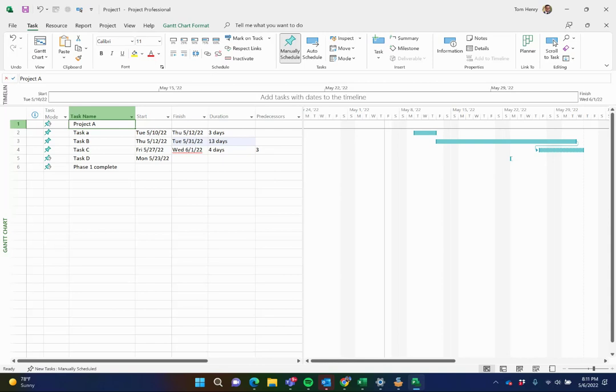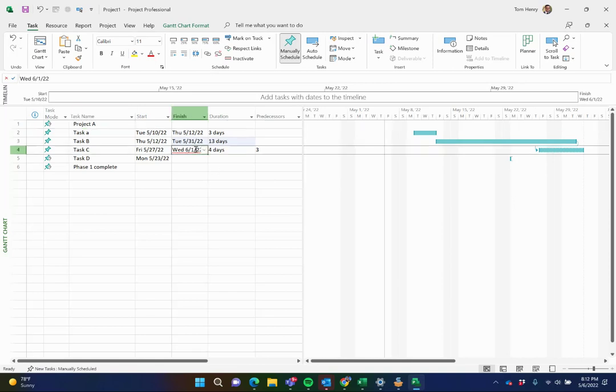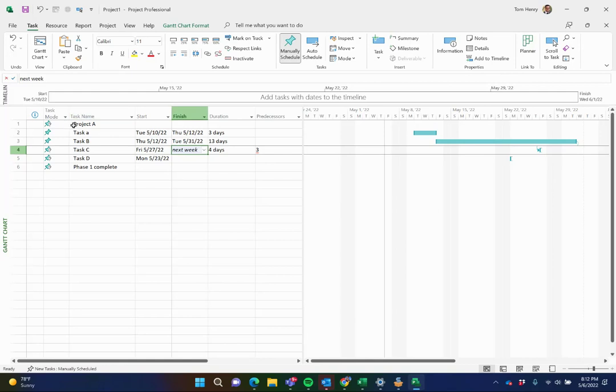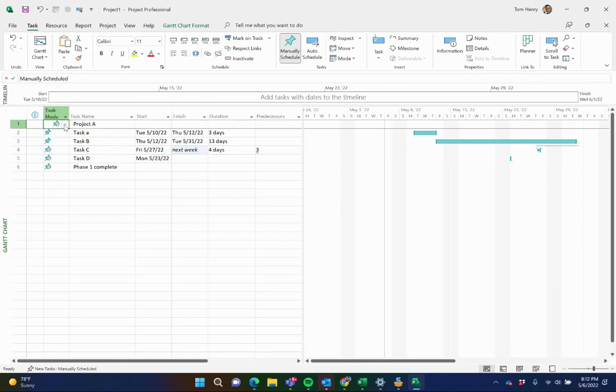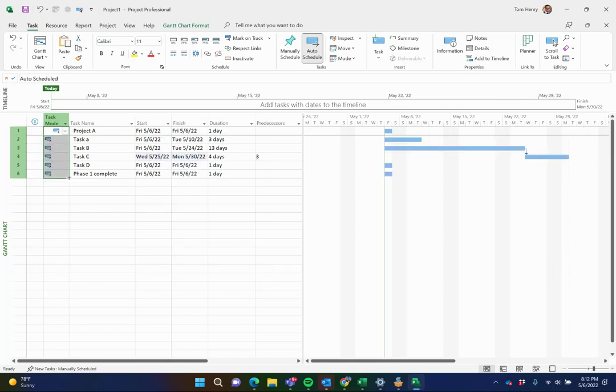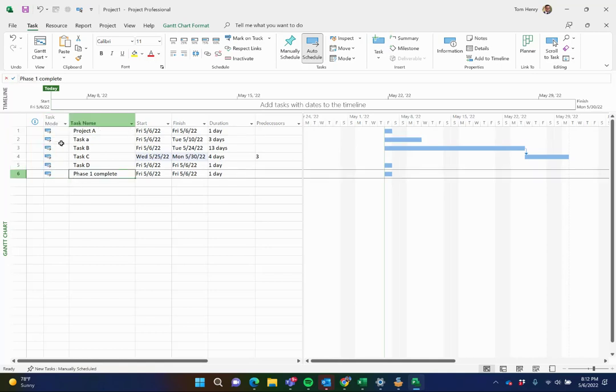By default, Microsoft Project has what's called manually scheduled tasks. This means that the scheduling engine is switched off. You are responsible for maintaining the duration and the start and finish dates. You can put anything you want in here, next week. And it'll allow it. It's italicized. It doesn't understand it. It's not computing it, but it's still there. Whenever you're ready, you can turn auto scheduled on. And I think they created manually scheduled tasks back in 2010 to give people that incentive to move from Excel to Microsoft Project quickly and easily.